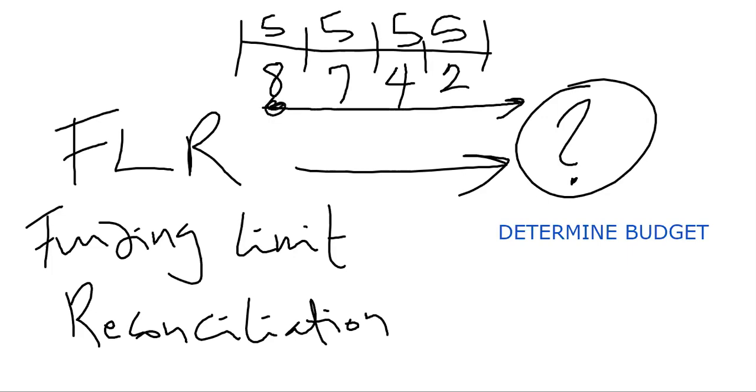the work associated with these particular months, because you've got a limit of 5, but you have work of 8. These need to be rescheduled. And that is the whole concept behind funding limit reconciliation, or you need express permission. But the bottom line is, you want to do a funding limit reconciliation just to observe any funding limits that may exist with the agency you're working with, the client you're working with, whatever business unit you're working with, or in your organization as a whole.